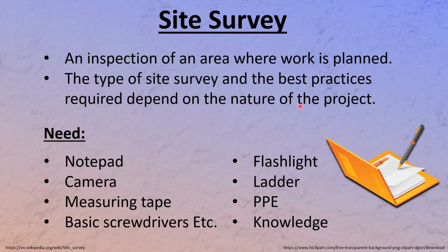So sometimes the survey takes about 15 or 20 minutes and everything is straightforward. And sometimes for a bigger project, the survey can actually last a week, because you go through everything, look into closets. But it's well worth it because that lets you plan out the job in a way that you don't get surprises that will cause you time loss and thus money loss.